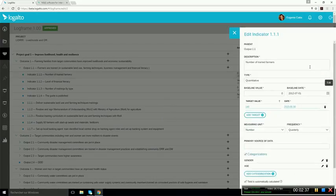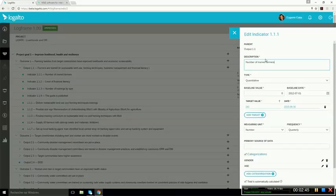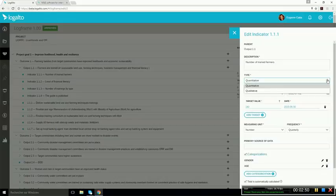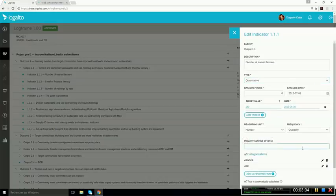The indicator form allows you to configure your indicator. So here you can see the fields that are required or optional. We have a description, a type, baseline value, and baseline date. You can have one or many target values and target dates, and the measuring units, and the frequency. Then below we have other information that can be added here, and this is all customizable, depending on your needs.